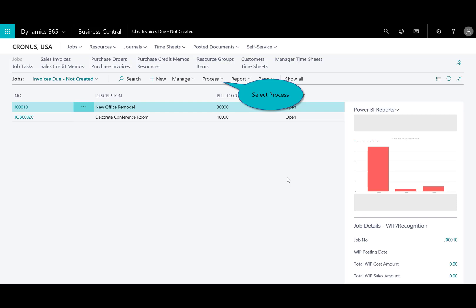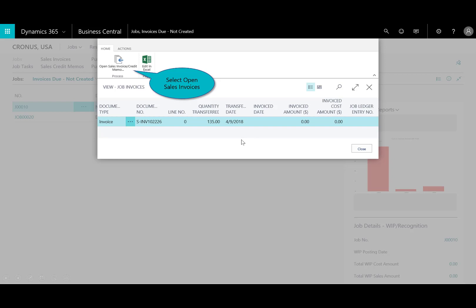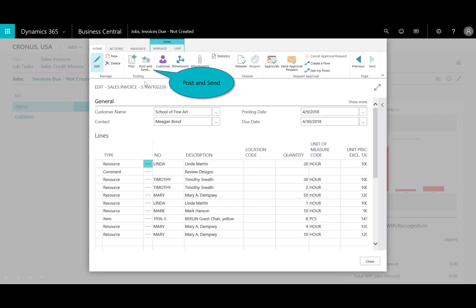And now I want to go ahead and post that. So, I'll come back in here to the job. I'll select the process. Do the invoice credit memos. And I'm going to go ahead and open the credit memos. Now, I can select just Linda's 20 hours individual lines, or I can post all of this. And I will do that. I'll post and send all of it. And now I get all the tasks that are outstanding and I need to collect on it. And I close that out.